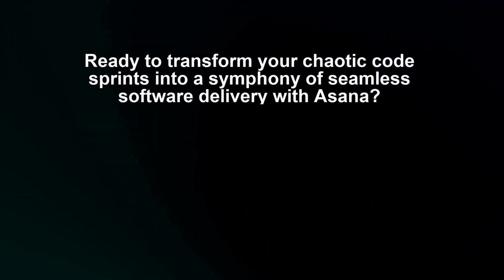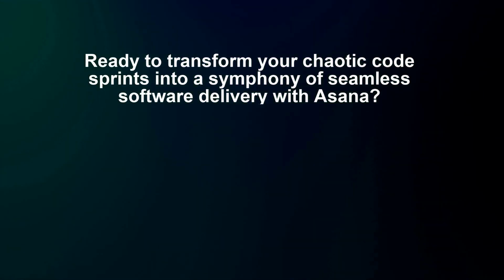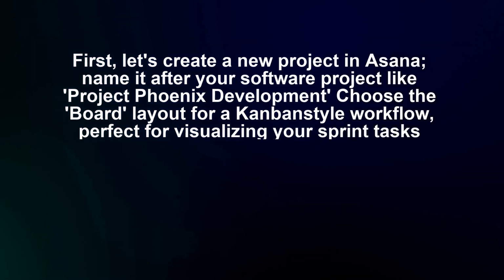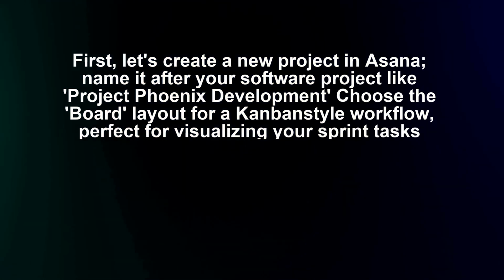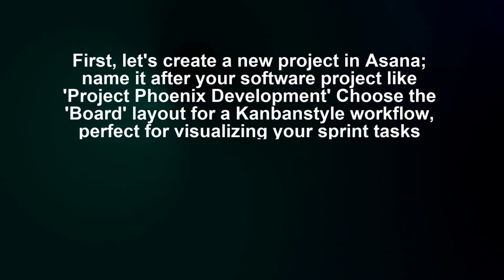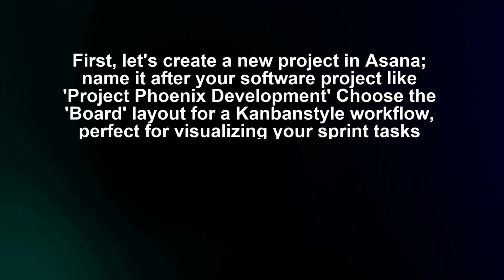Ready to transform your chaotic code sprints into a symphony of seamless software delivery with Asana? First, let's create a new project in Asana. Name it after your software project, like Project Phoenix Development. Choose the board layout for a Kanban-style workflow, perfect for visualizing your sprint tasks.